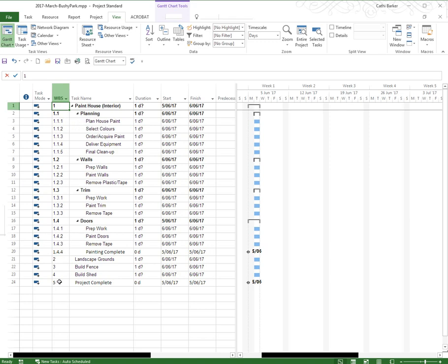This can be quite useful for people to identify tasks rather than refer to a task by its name, because its name could be long, or it might be a name like Chemwash, which appears like several times in that project. And so to be exactly clear about which one you're referring to, you could refer to its work breakdown structure number as opposed to the row number, which doesn't always print. So you've got to think, if they've printed out this project and they're referring to a certain task, and the task is a really long name, or that task is repeated several times in the project, it's easier to refer to that task by its number than by its name.